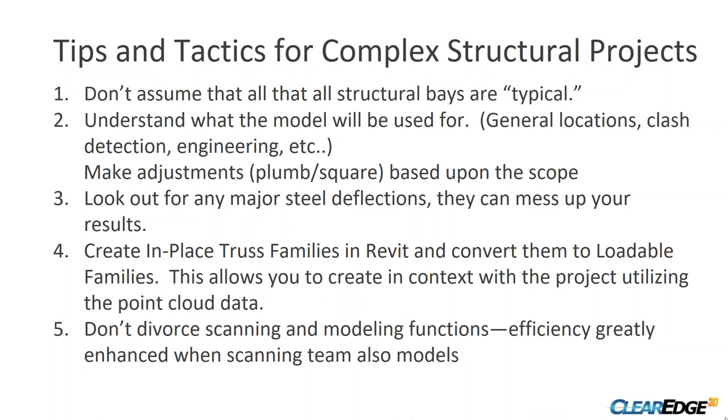So I talked about creating in-place families. In-place families in Revit will work phenomenally. There is a way to get it out of an in-place family and into a Revit loadable family, so you can use that workflow. You can speed that up by creating those typical Revit families and then using those throughout the project. And of course, best recommendation for a scanning and modeling team, don't divorce those two people. Keep them the same because you'll find much better productivity, much better understanding of the project, and you're going to end up with a much better result to give out to the client.